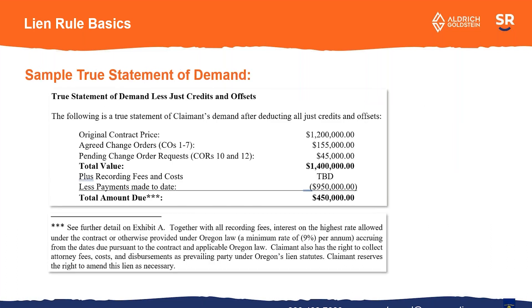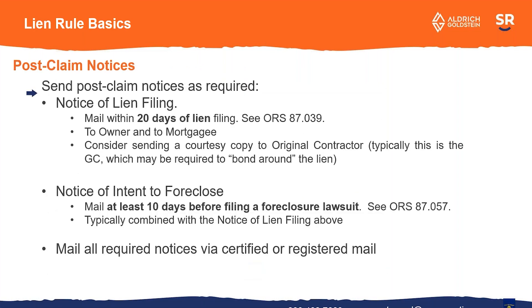Here's a sample true statement of demand, where you put in what the contract price is, what the change orders are, the total value of the work, and then subtract how much you've been paid — and that's your lien amount. Typically I would attach further detail and break it down between labor, materials, equipment, and services. The person receiving the lien needs to be able to ask basic questions and find out what the lien is based on.